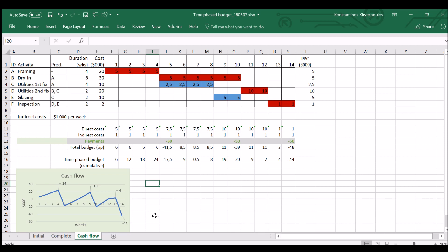So all in all, what has happened is I spent $106,000. Remember from my previous diagram, I received $150,000. So the difference is $44,000, which is the profit for this project.